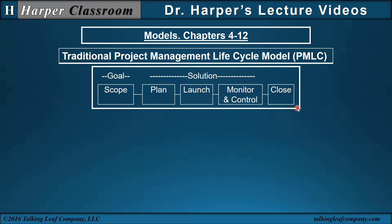Wysocki organizes his content starting with a project management lifecycle model. Here's an example of the traditional project management lifecycle model: scope, plan, launch, monitor and control, and close. In the scope phase, he describes a goal — the primary purpose or objective of the project — and the solution, which is how to achieve the goal.